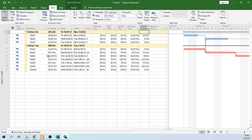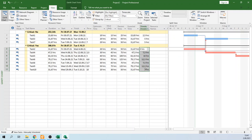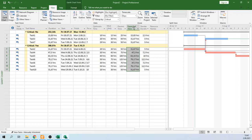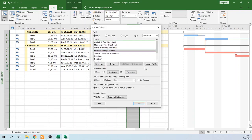Now we should group the tasks by whether they are critical or not. Go to View and then group activities by critical. The thing we need to calculate is the sum of expected time and the sum of standard deviation for the critical path, to get the project expected finish time and standard deviation. Go to Custom Fields, and under calculation for task and group summary rows, choose Rollup and Sum from the dropdown list, then click OK.